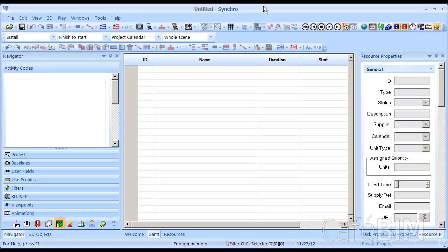Whether forwards planning or backwards planning, you may also have some certain milestones that you may need to hit, like taking down a crane before hurricane season, or completing earthwork before wintertime when the ground freezes over and is hard to work with. Another thing to think about before adding tasks is whether you want to manually determine start and finish dates for each task you add, or if you want your project management tool, Synchro in this case, to do that work for you.